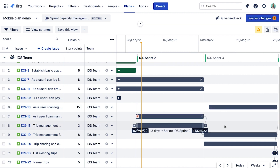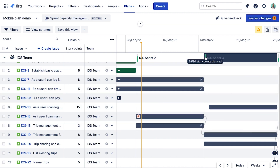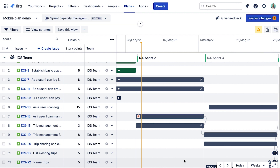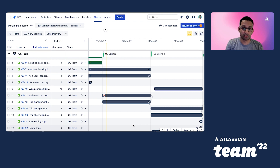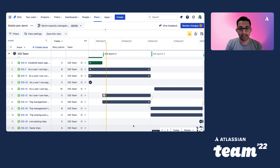Advanced Roadmaps updated in real-time. The roadmap reflects the calculation of what sprints an issue will be scheduled in, the size of the estimates on the issues, and the velocity of the team assigned to complete issues. You can look at your team's historical sprints to get an accurate estimate of your team's real velocity. There are some powerful features built in here to help you plan effectively. You can set certain sprints to lower capacity to plan for team holidays, training, or other commitments for the team.